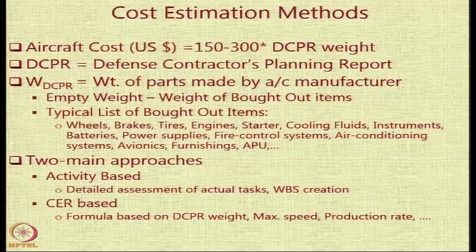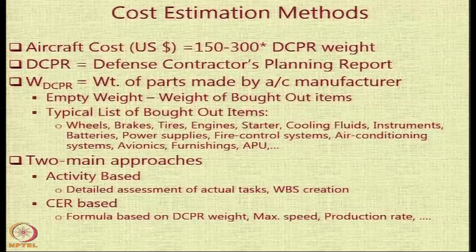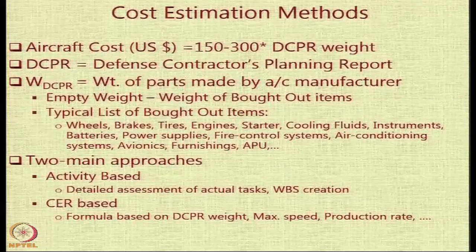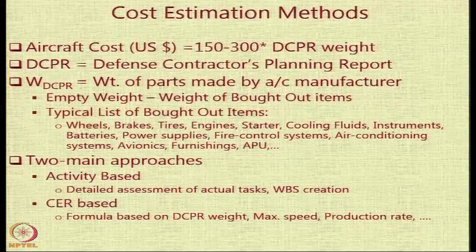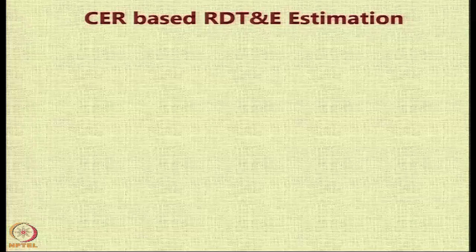You also have cost estimation relationship, or CER-based costing. These are used when you want to compare various aircraft and have an estimate of likely costs based on past experience. There are formulae based on the DCPR weight parameter, maximum speed, production rate, etc., which are used to estimate the cost of various elements.